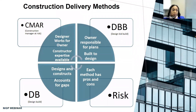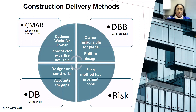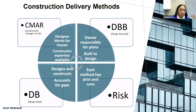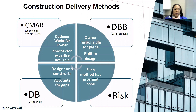In the design build or design bid build model, the owner is responsible for the plans — they get the plans, bid it out, and then build it. A lot of times the issue is that the consultant gets five years to design something, and we get six months to do the solicitation, putting increasing pressure on the construction firm. Those are things procurement can take a greater role in. Each method has a pro and a con — not one method is pristine in that regard.